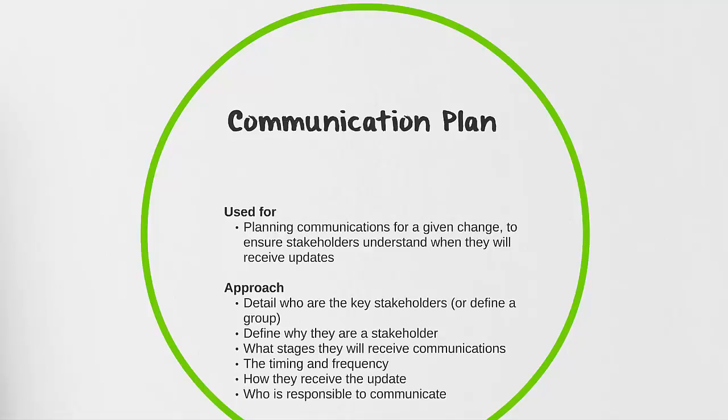What this means is that if I'm a stakeholder on a project, I would understand from this communication plan that maybe every other Thursday or maybe once a month, I'm going to be receiving an update from either a senior business analyst, a project manager, or some other member of the team to provide a status update as to where the project is and if there's any barriers or any success stories that want to be shared.